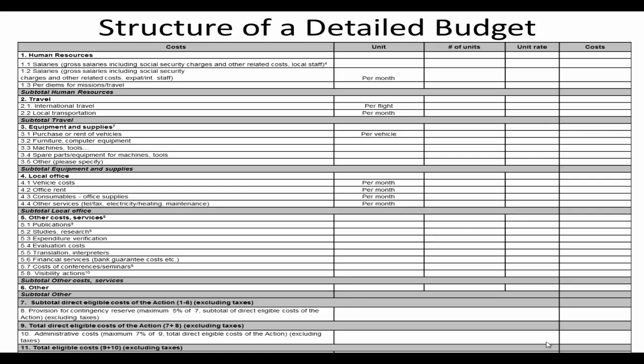If you're talking about, say, a research assistant, and you are budgeting for a monthly stipend, the unit would be a month, but then the number of units would be maybe 12 months, because you are planning for a year's research project. If it was a thesis, for instance, a year's research project, the research stipend will be paid on a monthly basis for 1 year.